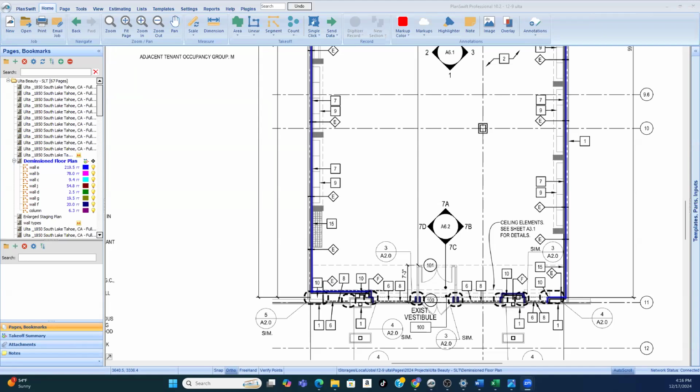Once we complete the estimate, we know how long each scope is going to take. And from that point, we can start to produce a construction schedule and all of that stuff. So that is when it helps with the project planning and execution. But we've got to know how to break that A plan up into its individual parts.